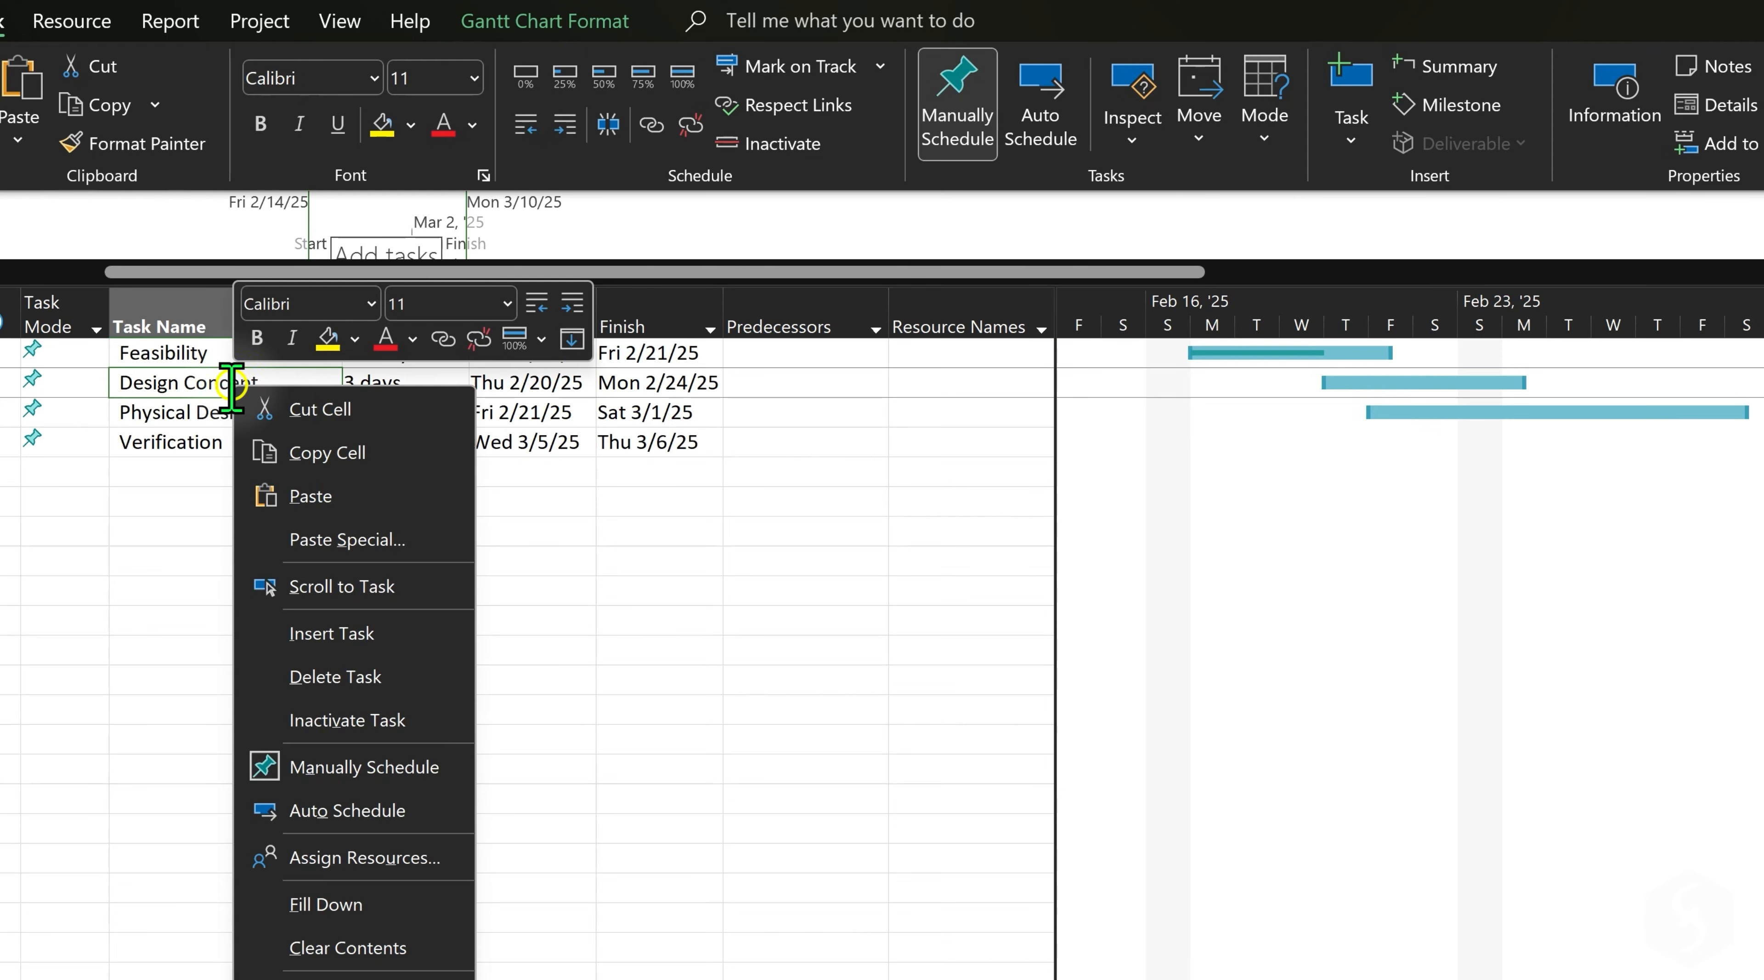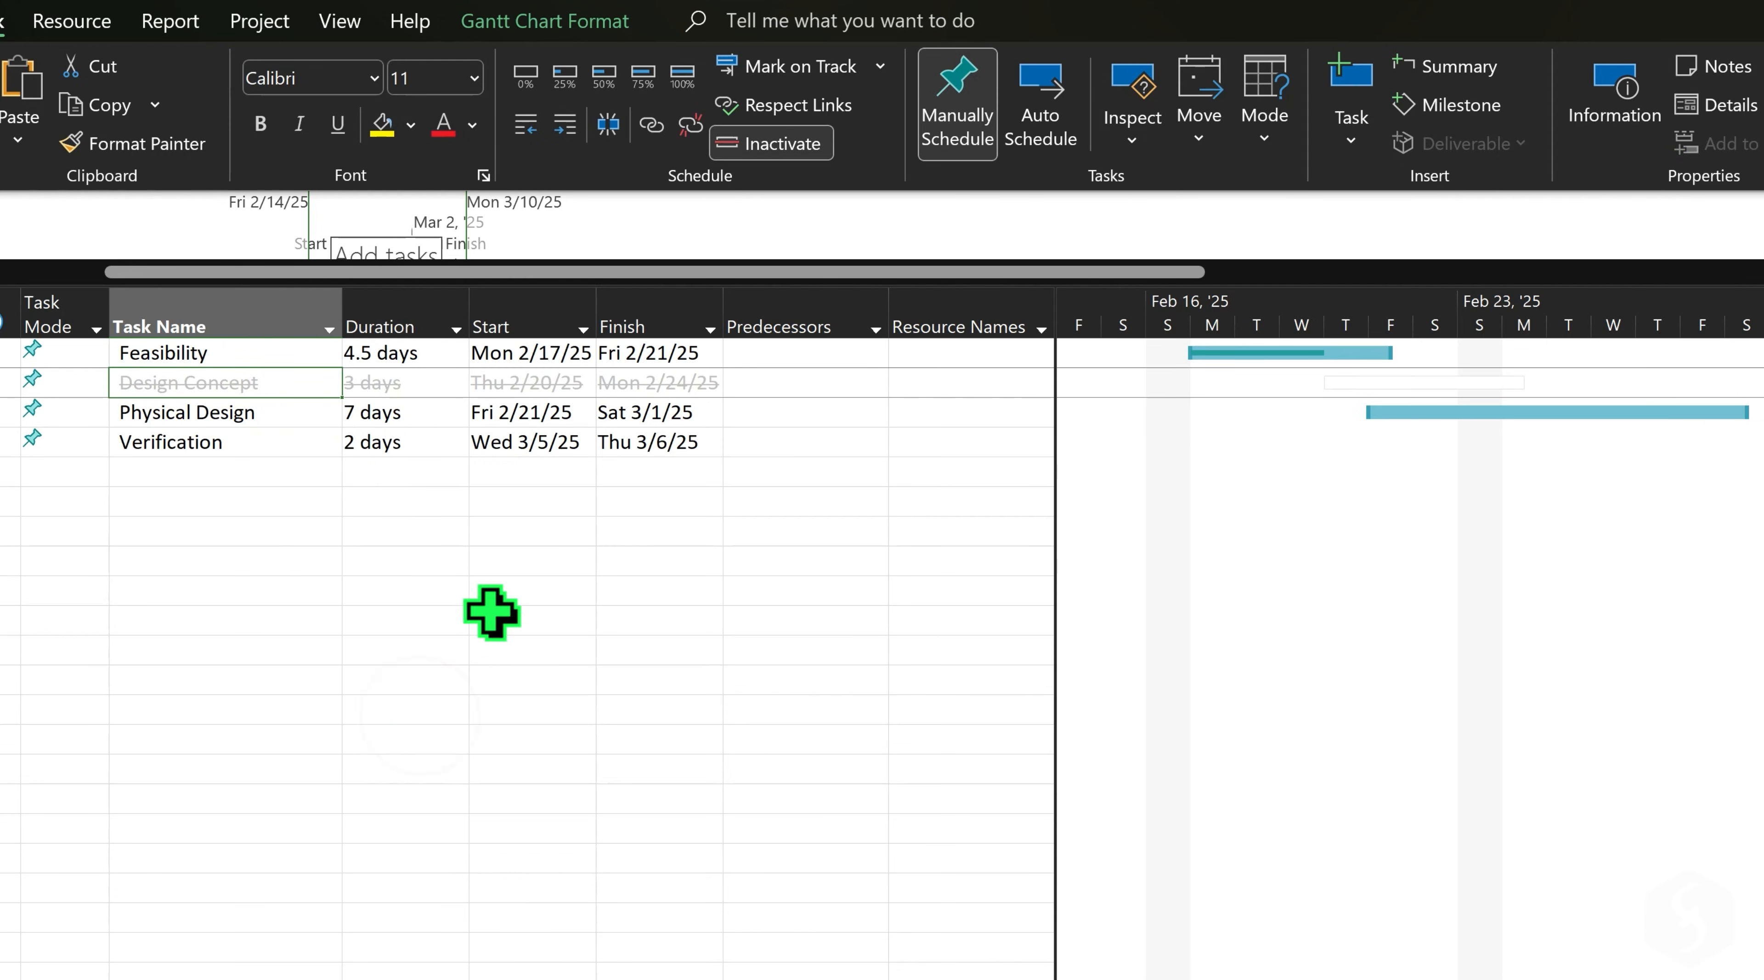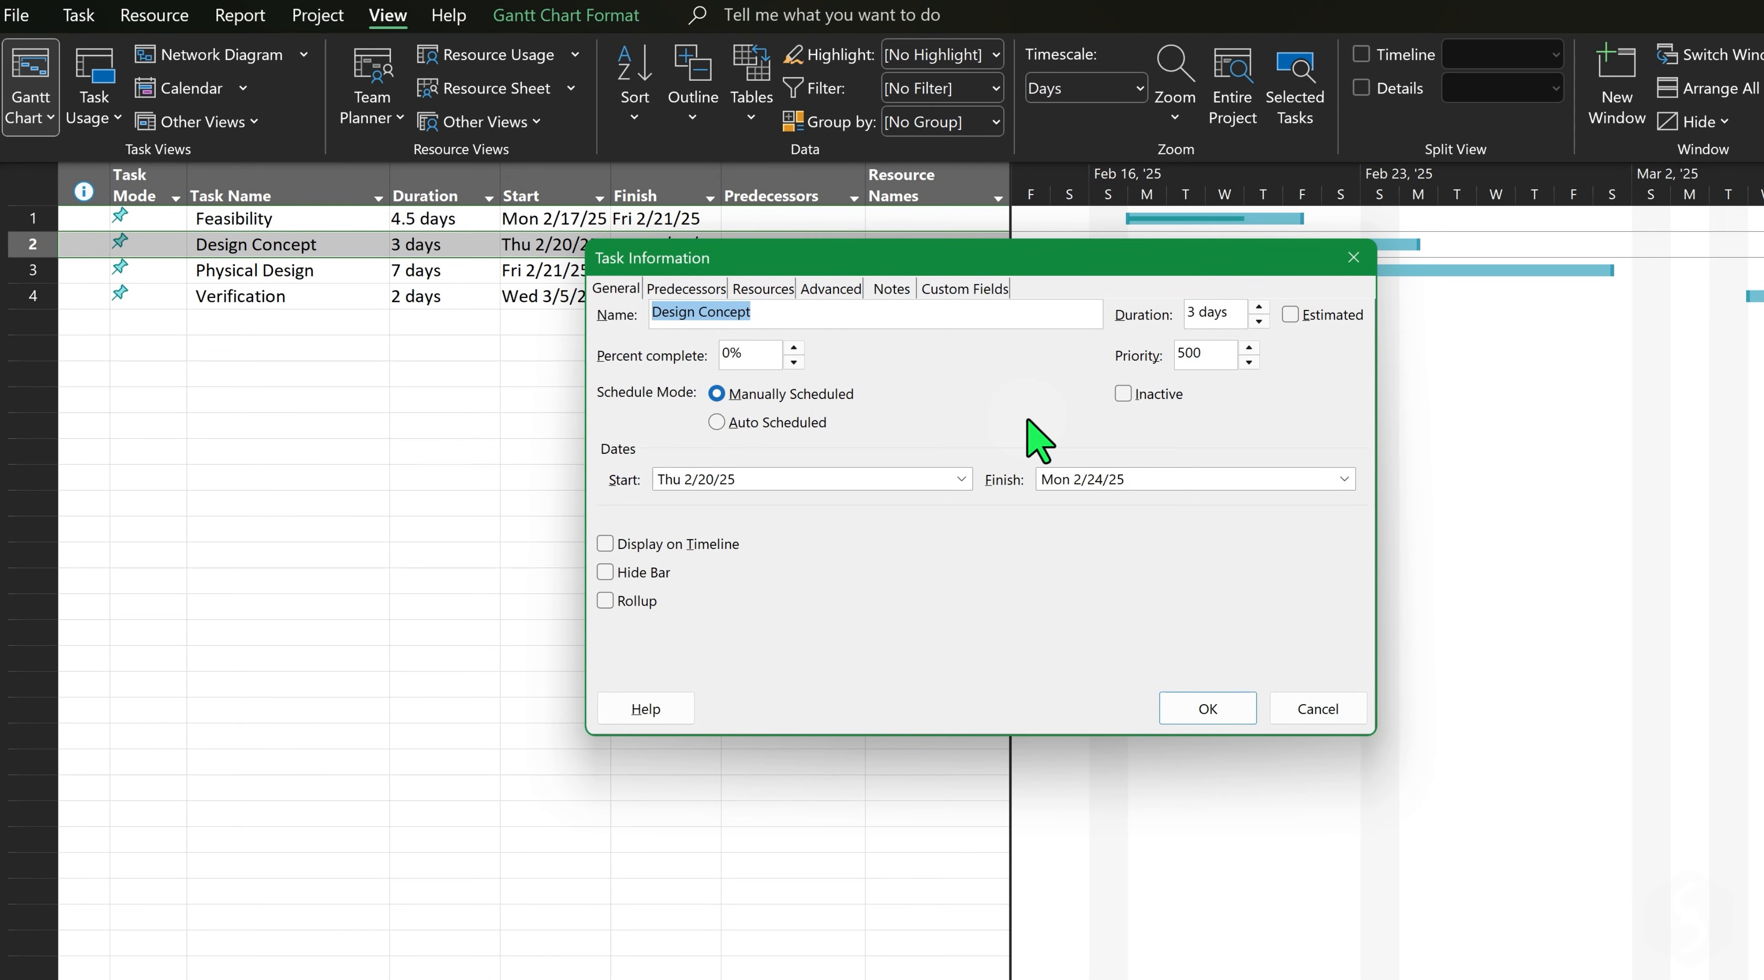To remove any task, right-click on it in the task sheet. You can also select Inactivate Task to exclude the task from the project timeline while keeping it tracked. Double-click on any task name to open the Task Information panel and edit other properties.